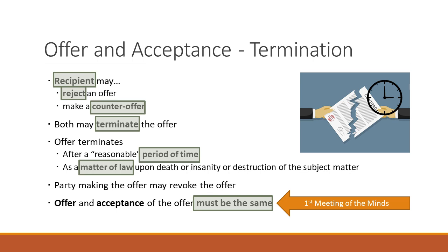The contractor didn't technically say, I'm revoking my offer, but the contractor came in and said, we have to change the price, it's going to go up by another X hundreds of thousands of dollars. So the original terms changed. There hadn't been the mere acceptance. And until my client, the homeowner, accepted the exact offer from the contractor, we didn't have a contract. And just recently, in the last week, we finally came to the final terms and conditions on the pricing for the project, and now we're going to sign the contract. So up until that point, there was no mirrored offer and acceptance. Okay?